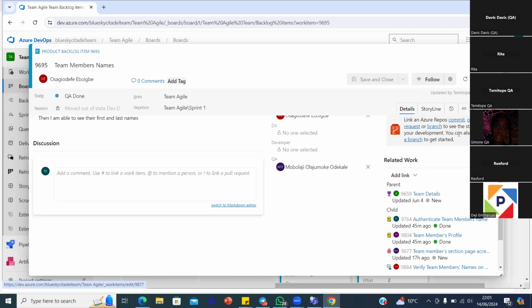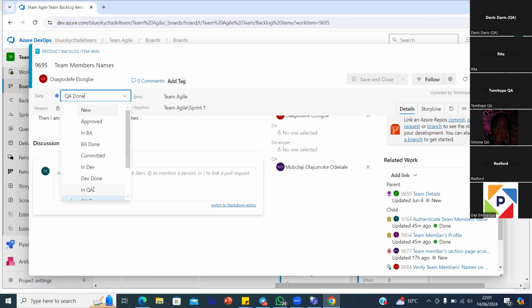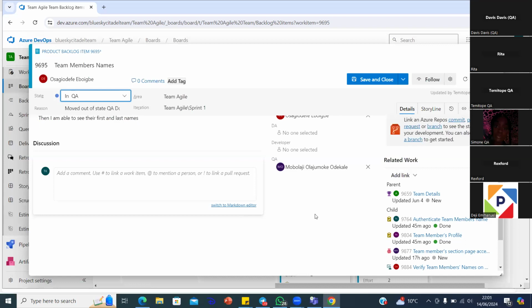So this one should be in keyword, right? Because you are doing it right. So let's put that in keyword, right? Because in keyword, you are saying you are testing it. Is that okay, guys? Yeah. Okay. Because you only put it in keyword done when you know you are finished. But fortunately for you, or unfortunately, I don't know, you found the bug, right? But this story should still be in keyword, right?